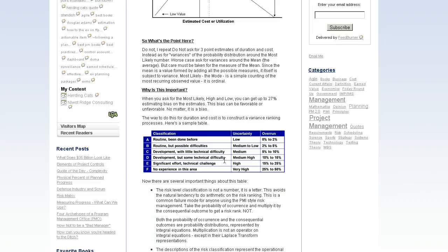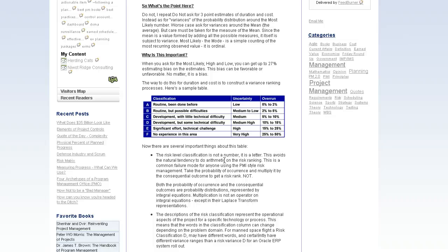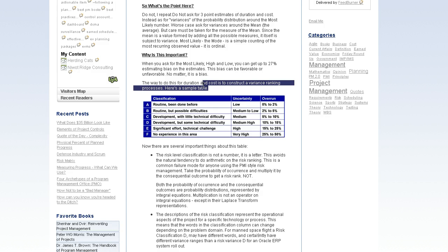Instead, Glenn has a classification system — and maybe I'm misunderstanding — but it's something similar to what I've done, with three buckets that translate into a triangular distribution, which I used for calculating how uncertain estimates are and what impacts they'll have on what we should budget for the project in cost and time.